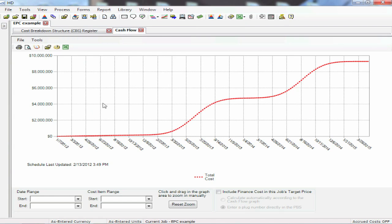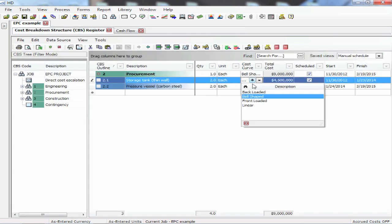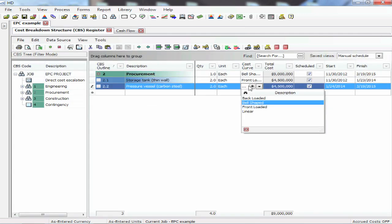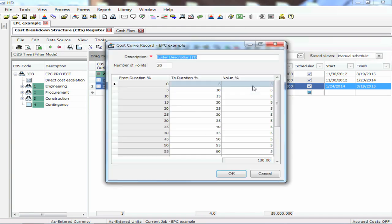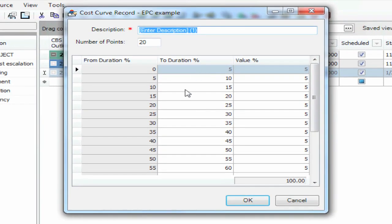So we'll do a bell shape curve for each of those, and now let's take a look at how that influences the cash flow graph. Those two major elements of cost — the storage tanks and those vessels — now you can see how their costs are ramping up and then slowing down. Now it might be more logical to do a front-loaded curve if it's something we're going to buy up front and incur most of the cost up front. The new feature in version 11 is that we can click that asterisk right there, go in and define our own curve, and put as many different points on that curve as we want.